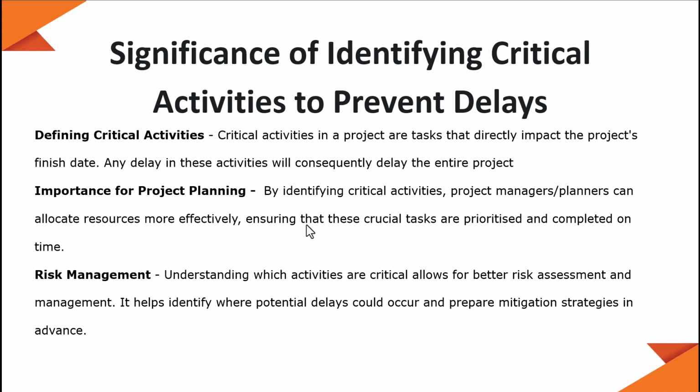So what is the importance of critical activities for project planning? When you identify the critical activities, you as a project manager or a project planner can allocate resources more effectively, ensuring that these crucial activities are prioritized and completed on time. So if you're a project planner and your project manager asks you to reduce the duration of the entire project, the first thing you look at is the activities on the critical path.